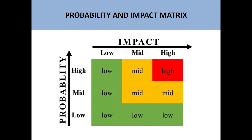Let me give you a simple example of the Probability and Impact Matrix. On the vertical axis we have probability — the chances of occurrence of an event or risk. On the horizontal axis we have the impact of that risk on the project. Every probability level will have low, medium, and high categories. Similarly, the impact will also be low, medium, and high. For example, if the probability of a risk is very high but the impact is low, we consider it as low priority.